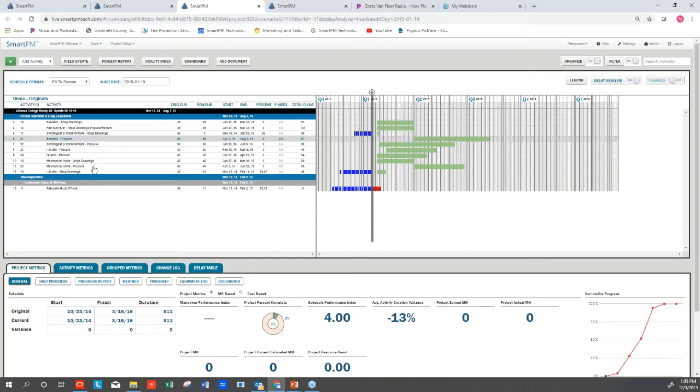Usually when you see a lot of procurement on long duration activity, that's okay because procurement periods are long. But that all being said, I have seen many a project where a procurement activity hijacked the critical path for something like millwork when the building wasn't even out of the ground yet, and people argued that millwork was delaying the job, and that's just not what happened. They're not even out of the ground yet. So we need to be able to look at that. We need to be able to assess that. We need to be able to maybe even model that if need be.